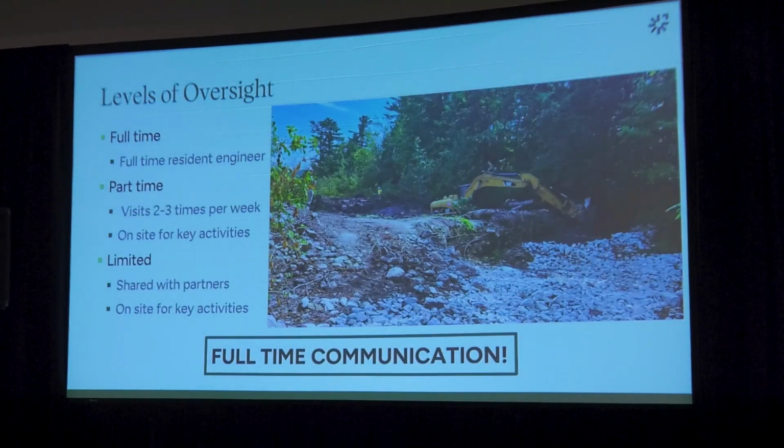It'd be really great if we always got to do full-time resident engineering and be on site all the time. But with our grant funding, that's not typically the case. So a lot of times we're doing part-time. So we're on site a couple of times a week, really trying to time that for the key activities so that we're there when we really need to be making decisions, reviewing things before a contractor gets too far away. Sometimes money's limited, and we're stuck with more limited oversight where you're kind of sharing that with partners, and that requires really full-time communication on any of these levels, especially when your visits to the site are limited.